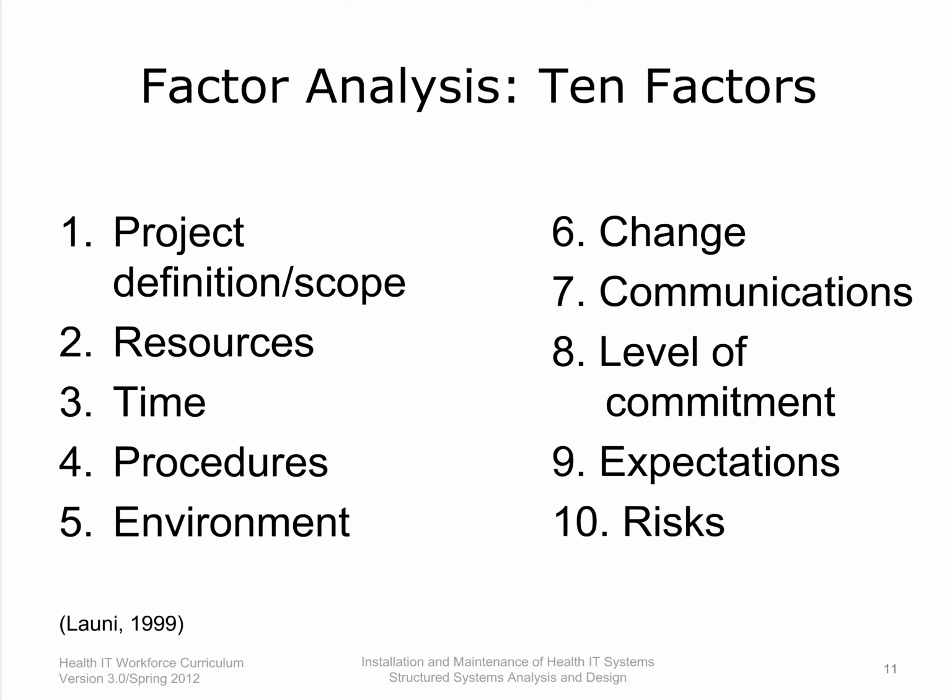Resources. A factor analysis attempts to identify all of the necessary resources needed for the project's success. This includes monetary, technical, personnel, or special materials needed. Time. You should calculate the actual work time needed to complete the project as well as the overall timeline. Procedures. Most projects are subject to special policies and procedures to ensure proper outcomes are realized. Here, you should catalog all of the relevant organizational requirements as well as any regulatory policies or mandates, financial reviews, special methodologies, or any other requirements.